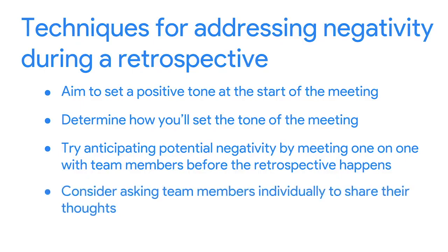A single negative voice can derail otherwise productive discussions. As the retrospective leader, it's your role to step in when one person's negativity dominates the conversation. To deal with negative participation from an individual team member, consider asking team members individually to share their thoughts.